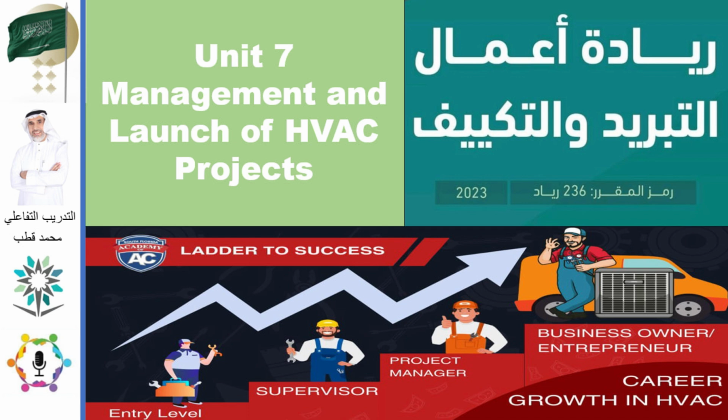The document even gives a really concrete example, that cooling and air conditioning center again. It shows tasks spread over 12 months. Owner does this, Mohammed does that, Ali handles this part. Wow, very specific. Yeah, it details everything from selecting the idea in month 1 right through to a pilot operation in months 10 and 11. That level of detail makes the whole concept much less abstract. That detailed timeline really does ground the process.